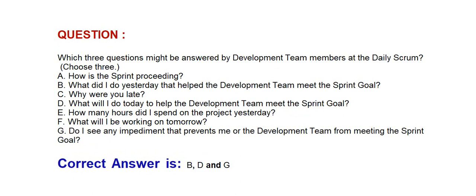Next question: Which three questions might be answered by development team members at the daily scrum? Choose three options. Option A: How is the sprint proceeding? Option B: What did I do yesterday that helped the development team meet the sprint goal? Option C: Why were you late? Option D: What will I do today to help the development team meet the sprint goal? Option E: How many hours did I spend on the project yesterday? Option F: What will I be working on tomorrow? Option G: Do I see any impediment that prevents me or the development team from meeting the sprint goal? Correct answer is Option B, D, and G.